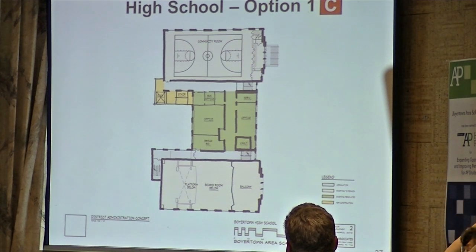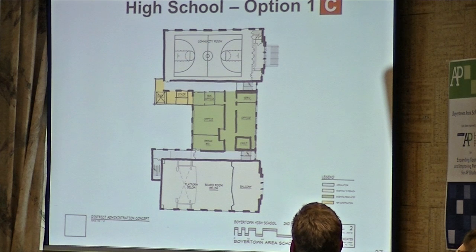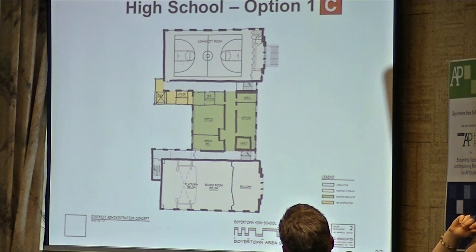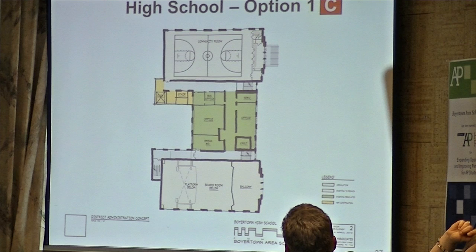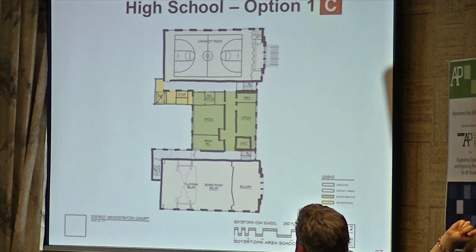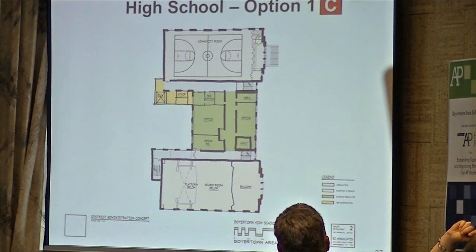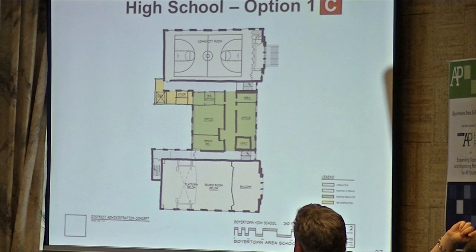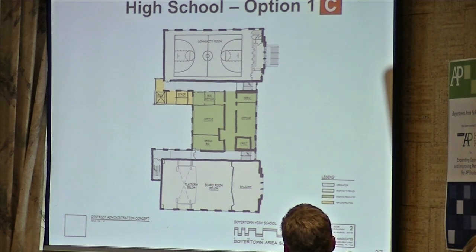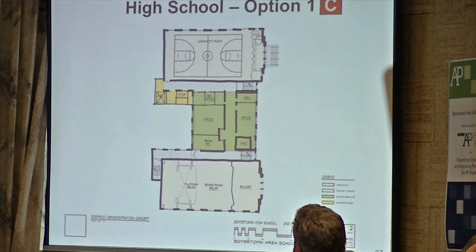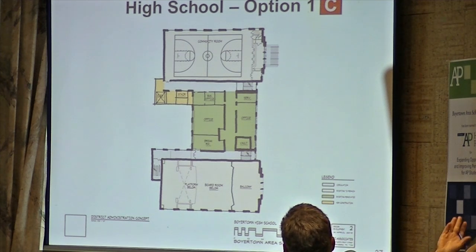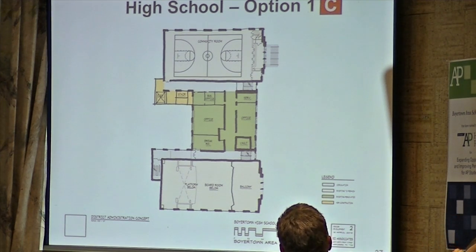So if you wanted to do that as a community center and as parking, we'd have to go back and talk to the borough about the parking requirements, because there's an auditorium and a gym in that space, and based on the ordinance, the seats in those spaces generate parking counts. We would have to calculate the parking, and maybe they would give us a waiver to do that.